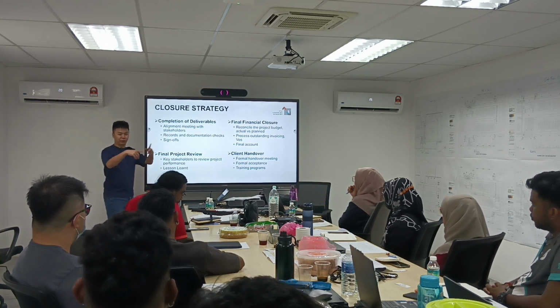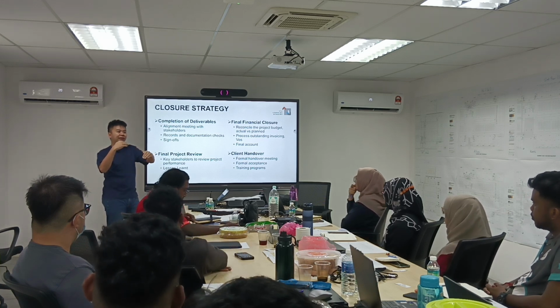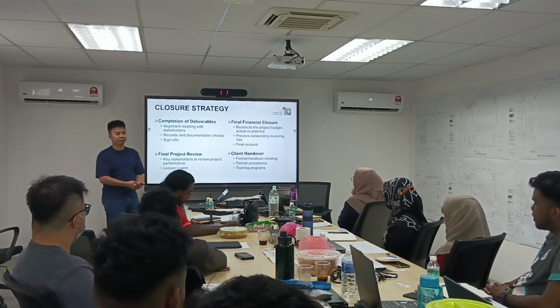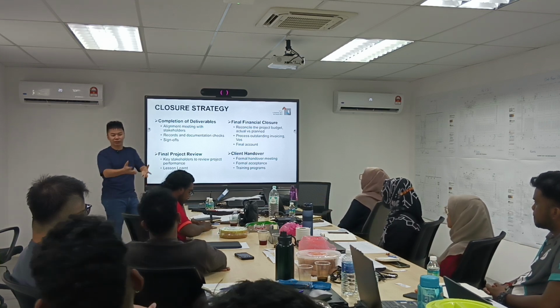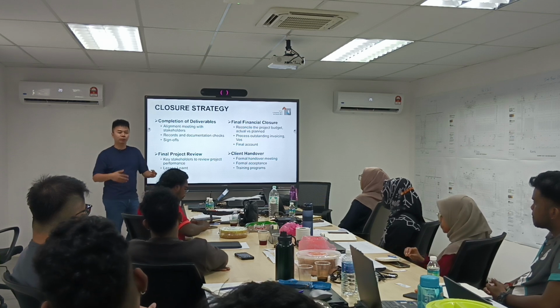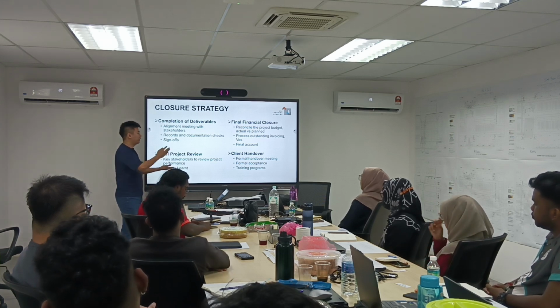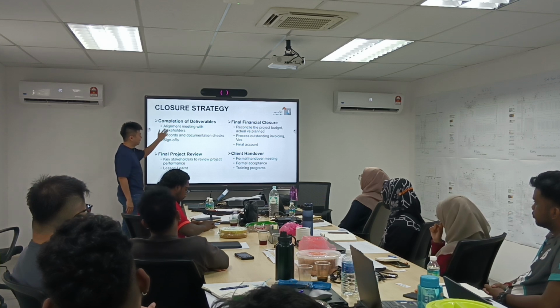Instead of like what we're doing now, I know that you guys give them some training, right? But is all this training signed off? No, right? It's just you guys giving training. Then training after training that you're giving, they still ask you for more trainings, right? So that's the problem. So we need to put a cutoff. So we should do an alignment meeting.